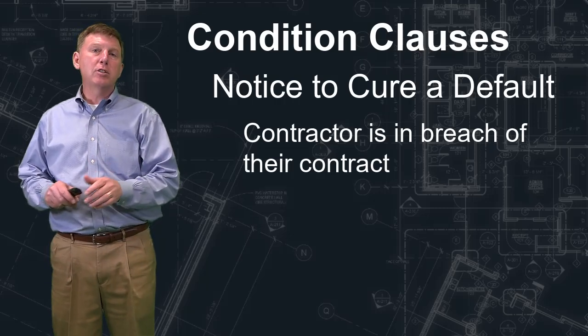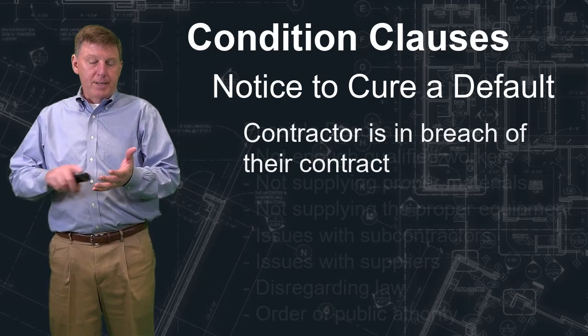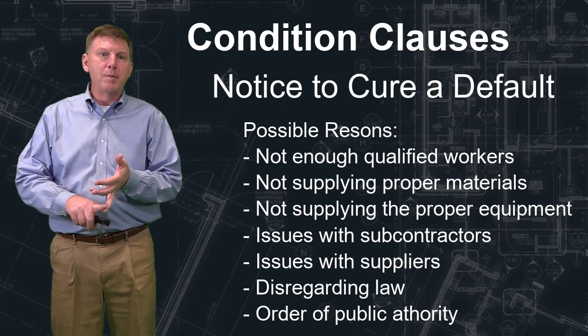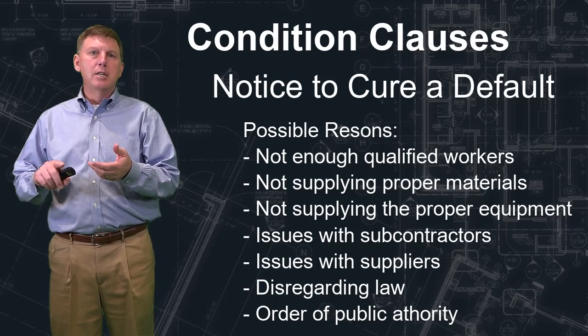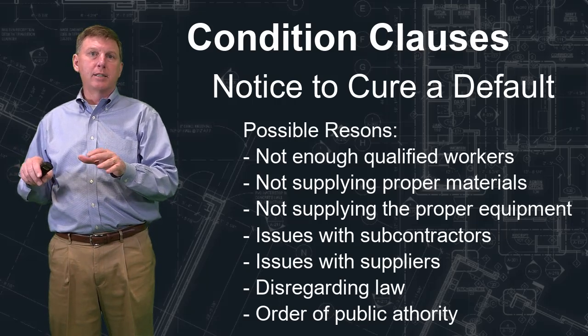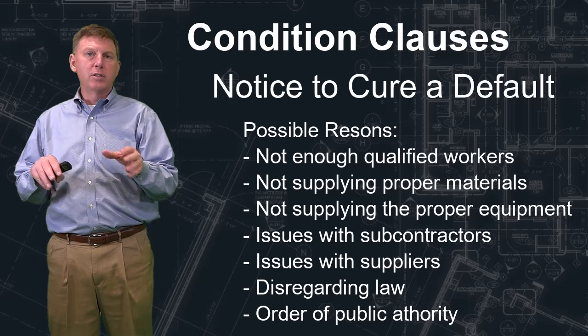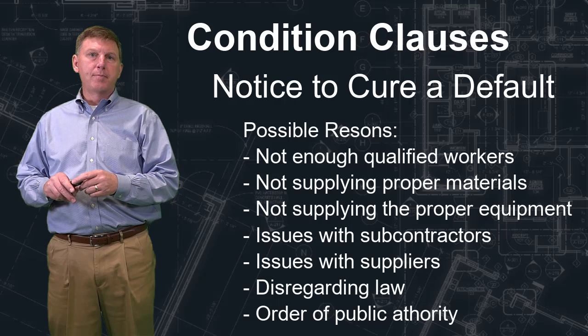If you get a notice to cure default, you're not doing too well. You didn't have enough people on a job, you're falling behind schedule, you don't have the right equipment on the job, something's not right. And this is all identified by the construction administrator, the architect, or the owner. And they're going to tell you, you need to fix these things.